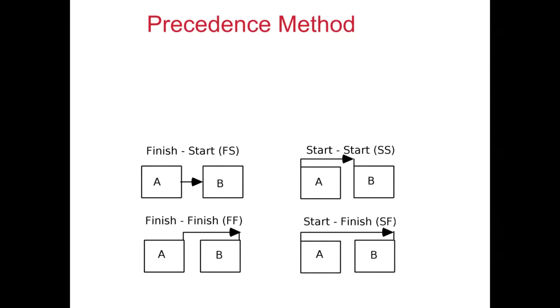All right, so while doing previous examples, we did talk about two relations. One is finish to start and the other start to start, but there are four relations in total, including finish to finish and start to finish. But I must say, the two top ones are the most common ones.